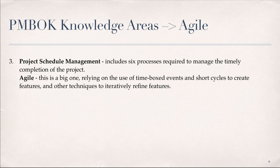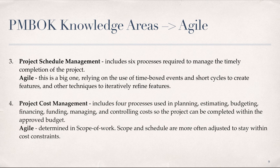Project Schedule Management includes six processes required to manage the timely completion of the project. In Agile, this is a big one, relying on the use of time-boxed events in short cycles to create features and iteratively refine them. Project Cost Management includes four processes used in planning, estimating, budgeting, financing, funding, managing, and controlling costs so the project can be completed within the approved budget. In Agile, scope and schedule are more often adjusted to stay within cost constraints.